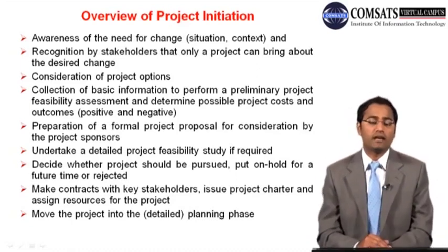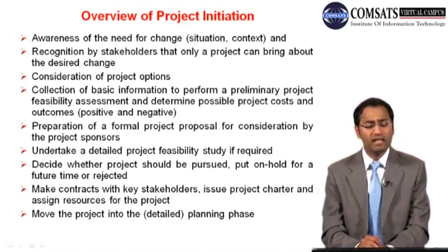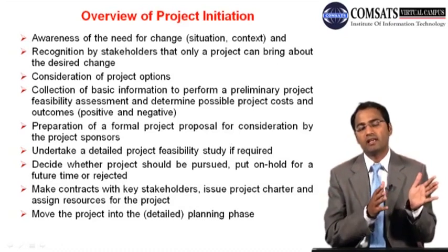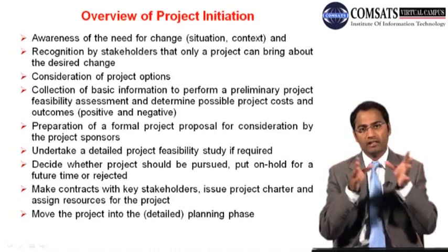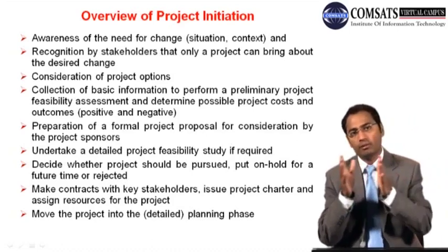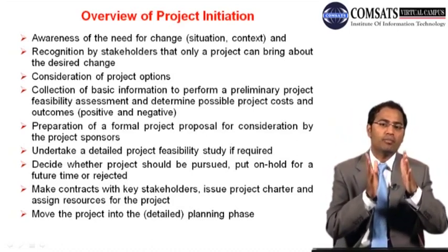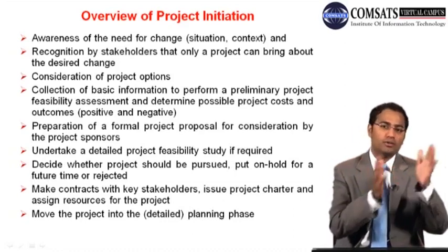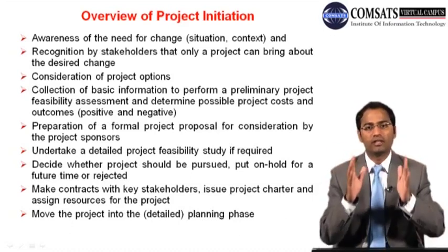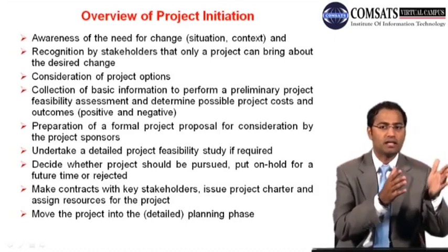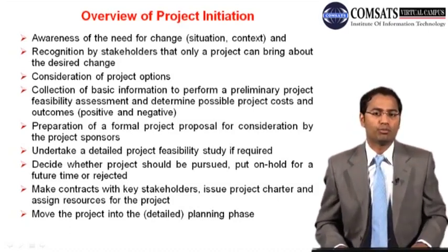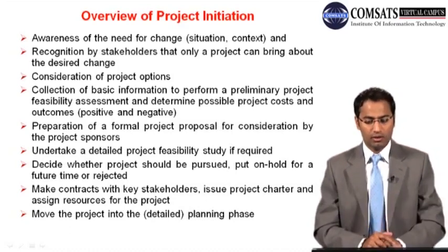Now, there is a very important thing as far as feasibility is concerned. When it comes to project feasibility, people are so much focused, and as we were discussing the other time, the operational stakeholders are very important. So when it comes to feasibility, it should not only be of the project, it should also be of the product. If you have selected a project based on project feasibility, and you have ignored the product feasibility, then you are very much likely to face failure, like the example I quoted earlier. Your project may not even be used by that organization. So feasibility of both the project and the product is a very good thing.